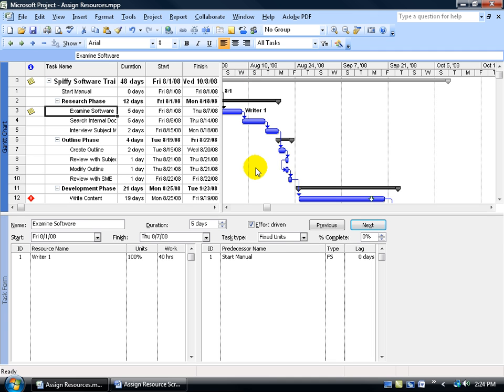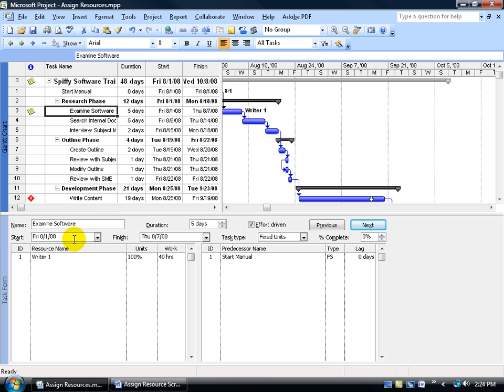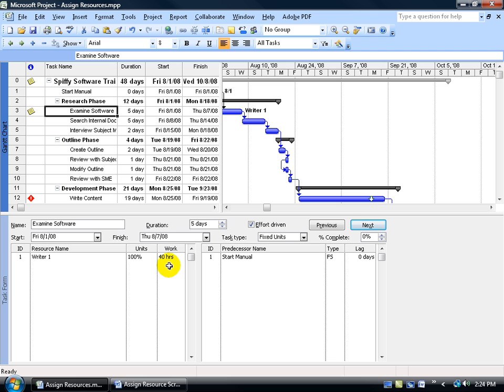Again, the top pane, it hasn't changed, is my Gantt chart. And then down below, it's split it into the resource view. And you'll notice that my Examine Software, what I have selected up above, gives me more detail view down below. It gives me the Examine Software again. It gives me the start and finish dates, just as you see it here. But it also gives me the resource name, the percentage of units assigned of that resource to the task, which is 100%. He's giving it all eight hours a day. And he's going to be working 40 hours, which makes sense because it's going to take five days to complete this task, which starts August 1st and goes through August 7th.